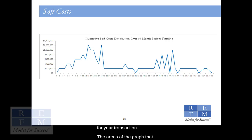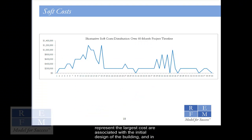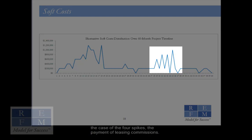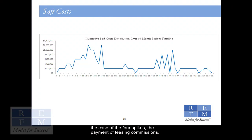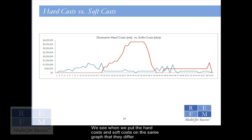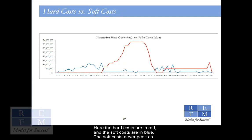The areas of the graph that represent the largest cost are associated with the initial design of the building, and in the case of the four spikes, the payment of leasing commissions. We see when we put the hard costs and soft costs on the same graph that they differ considerably, both in scale and timing. Here the hard costs are in red, and the soft costs are in blue.